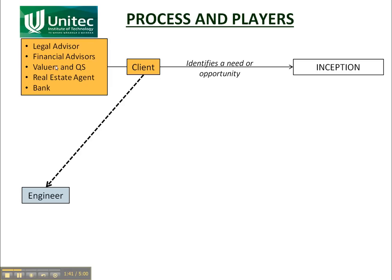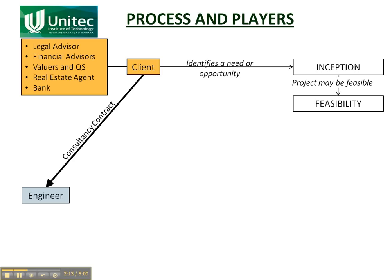He talks to his accountant about his legal status and how he's going to finance this. If he's a developer, he's interested in how much he's going to get out of rent or something like that, so he talks to valuers and real estate agents about how much he's going to be able to sell or let it out for. He will also go to the bank and ask how much money he can borrow to do this project. If he decides that it's feasible and he wants to do it, then he goes on to the next stage, which is the feasibility study.